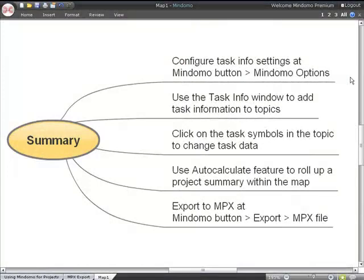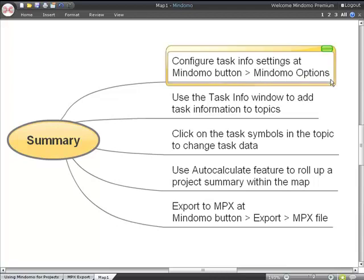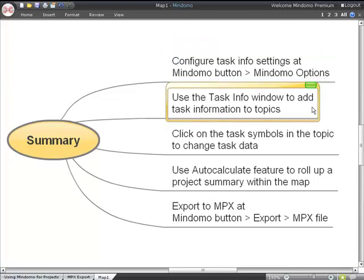Let's summarize the ways that Mindomo can help you keep track of project information in your maps. You can configure the task info settings by clicking the Mindomo button and going to Mindomo options. You can use the task info window available in the home menu to add task information to selected topics.